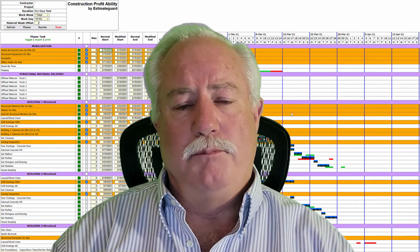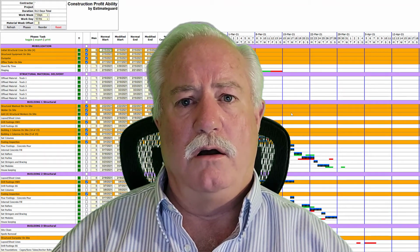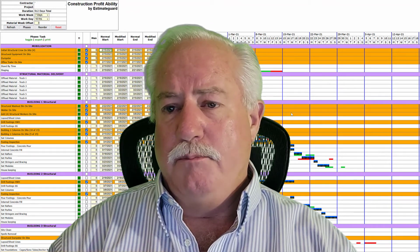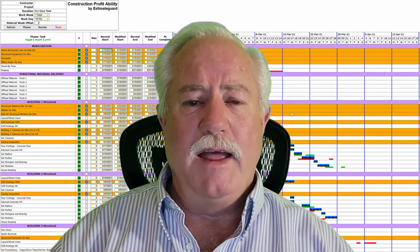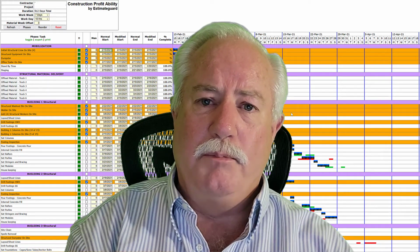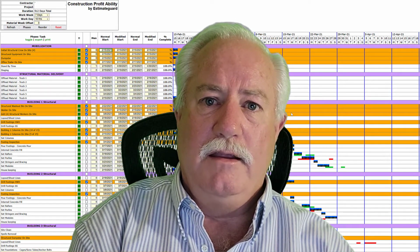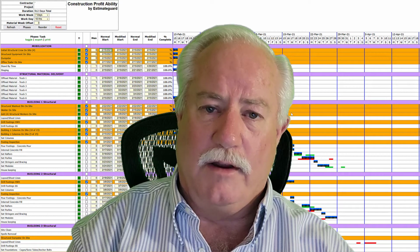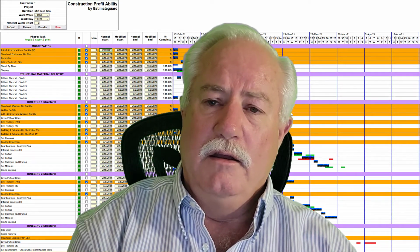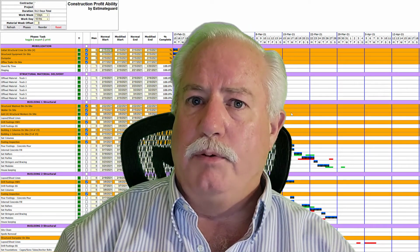You don't want to have to put that material out for quote against 7 companies and wait for all of that pricing to come in and then try to make a decision on it. Because while you're doing that, it's going to cause turmoil in your schedule. Those people are going to have to stop working on the tasks that they're working on in sequence. They're going to have to delay those tasks until that material comes in. So the quicker you can get it there on site, the smoother that project's going to run.